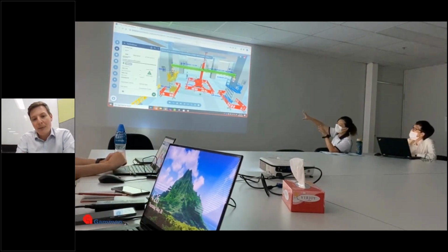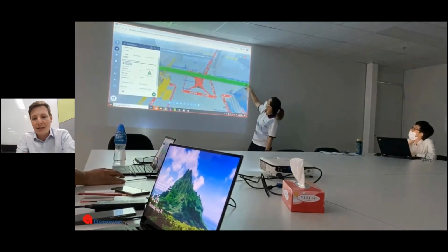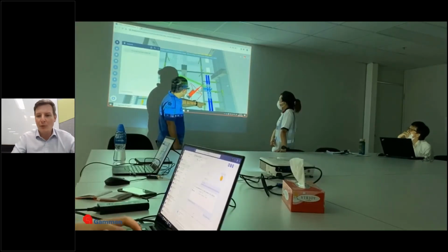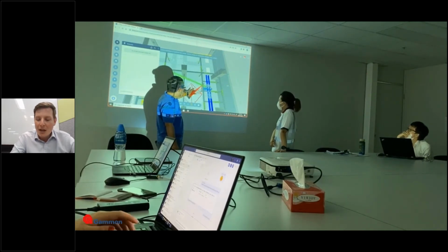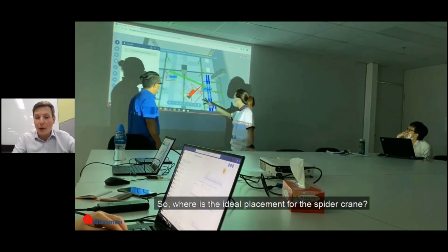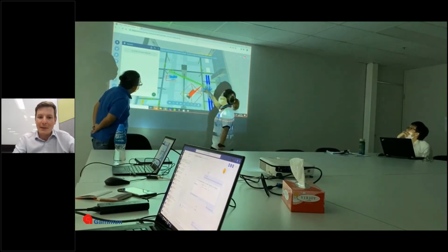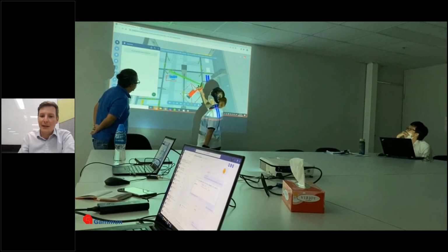As the issues are coming up, I'm tagging them in that meeting. So we're discussing, we're moving around, we're interrogating that data all together. And it really was incredible what got brought up. In a 1 hour session, almost 100 questions were asked. This involved the placement of equipment, all really depending on the progress of works. We couldn't install some temporary steel in one location because there was already some MEP that had been installed. So we had to reorganize where that temporary steel was going to be and reorganize where those machines would be.